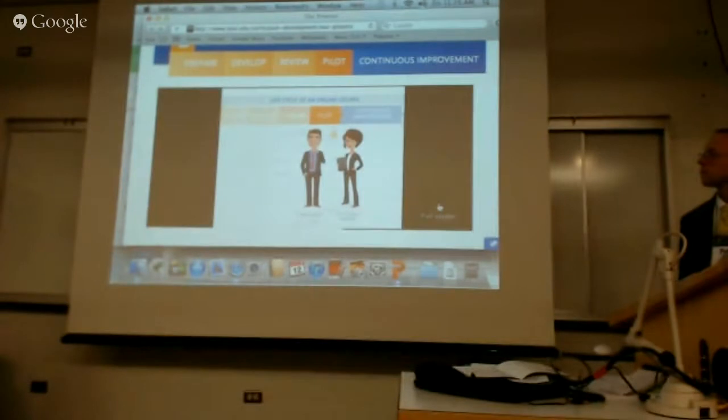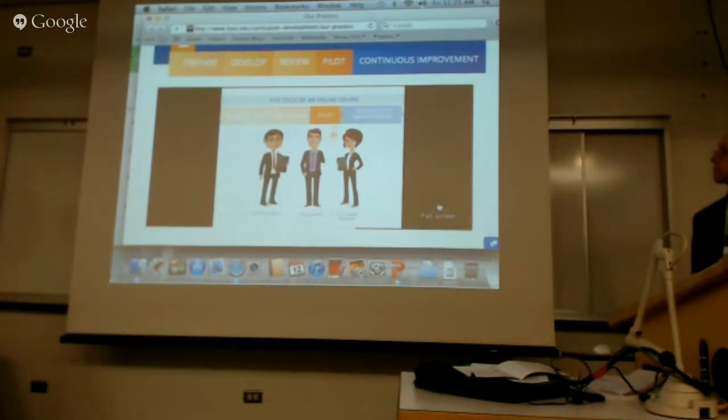Once the online course has been created and reviewed, one section of the newly designed course is taught to students during the pilot semester. An online adjunct instructor joins the course council to teach this section of students. Each week, the course council evaluates previous, current, and upcoming lessons and makes necessary adjustments to the permanent version of the course. An important transition occurs at the end of the pilot semester.